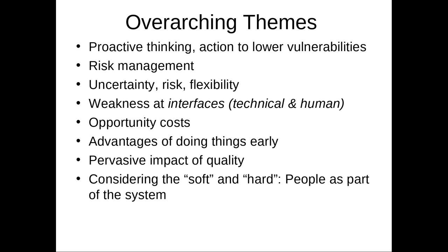A team with low quality code is often associated with low morale, high turnover, high amounts of burden associated with it, inability to deliver on time or on budget or with the requisite perceived value, and often at risk of a stakeholder canceling a project or being unhappy with the project. So quality has this sort of central component in the dynamics of projects. It drives project dynamics like few other features, ladies and gentlemen, few other elements.